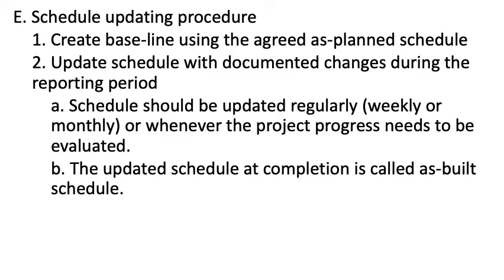And then number two, you make changes using the actual data from the construction field and update that information on the baseline schedule. That's when you change start dates, finish dates, durations of the activities, or add new activities into the baseline schedule to get an updated schedule.